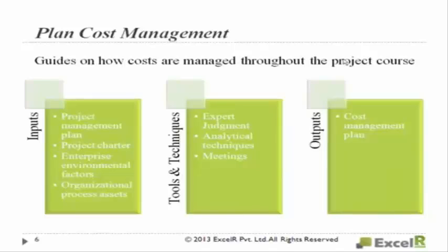So what is a way of doing it? Okay. And analytical techniques also look into the detailed ways to finance project resources, such as making, purchasing, renting or leasing. You have to do analysis whether it's good to buy or it's cost effective if I make it on my own. This is called make or buy analysis. Make or buy. Should I make the product on my own or should I buy it? Sometimes is it good that I rent? Sometimes it's good that I lease.